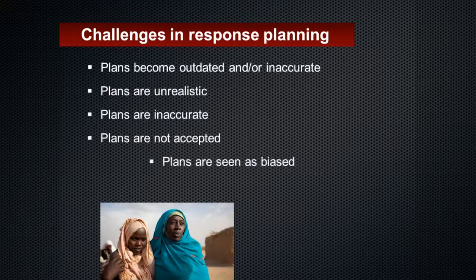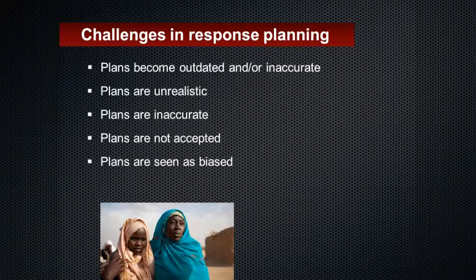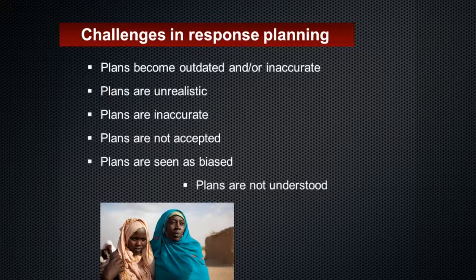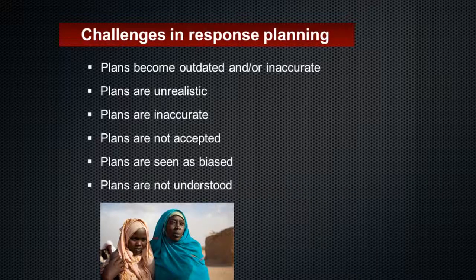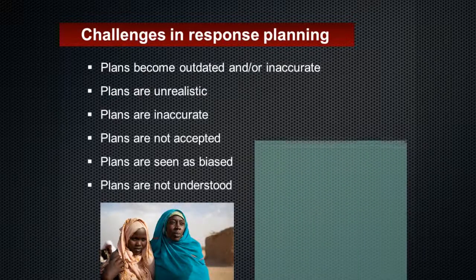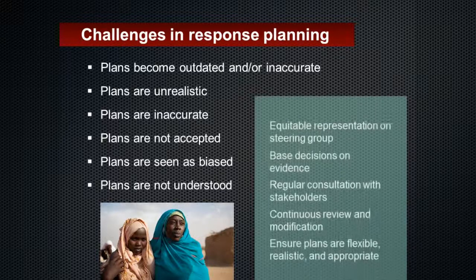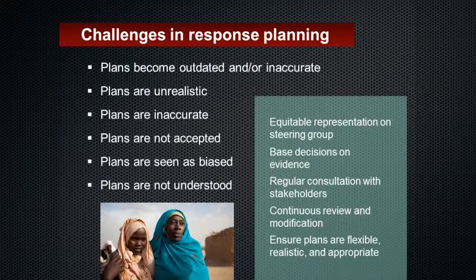Plans are seen as biased in favour of the CLA or more powerful WASH agencies because of inadequate stakeholder representation. Plans are not understood because they use inappropriate language or terminologies, or lack relevance to the context. The majority of challenges can be addressed by regular consultation with stakeholders and equitable representation on steering groups, basing decisions on evidence and continuous review and modification to ensure that plans are flexible, realistic and appropriate.